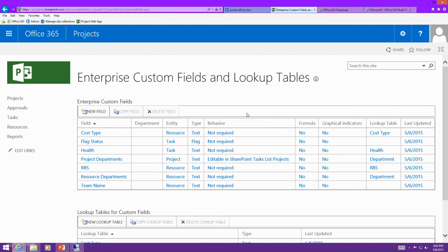An example could be that you want all your projects to have a size or a scope. Maybe you want to know, when someone creates a project, is the scope a one-person project? Is it scoped at the team? At a department? Or at an organization level? When you have these custom fields, they're made available in our reporting database, or if you're online, it uses OData. When you look at projects, you can see what these custom fields are, and you can build reports saying, give me all the projects that are individual, or all the ones that are across the organization. That gives you the ability to report and tag projects the way you need for your own dashboards and reporting needs.